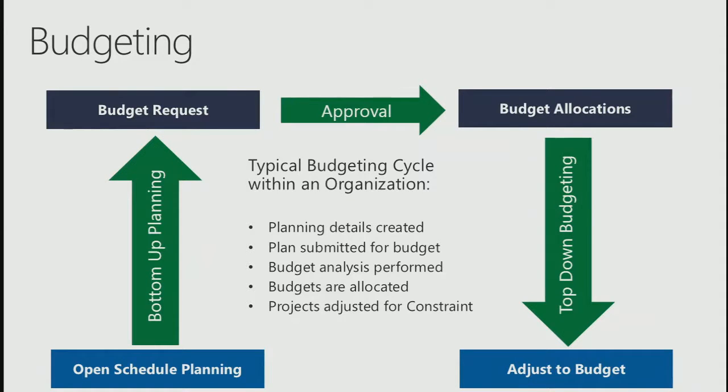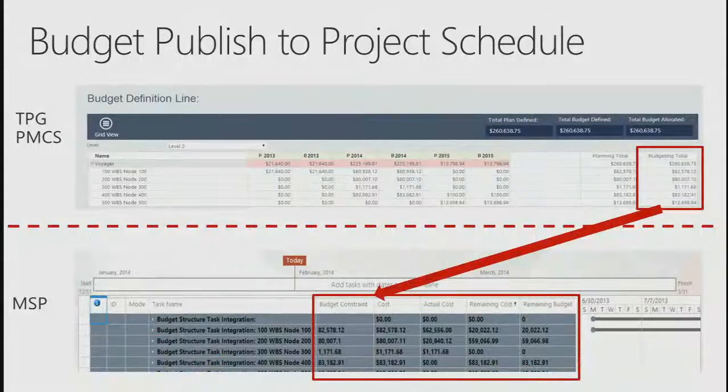And what we see here in our solutions that we have with IPMCS, for example, what we do is we can give you a top-down budget approach. We can break down budget structures, which makes sense on the top line here, and let people allocate the budget after having received the inputs from the projects, and then give this information back to the projects in order to check the budget over the next periods. And usually, again, every quarter, that's very common, can be also every month. It shouldn't be every year. You should be really more tied into this process and more frequently check and control your budget. You will be updating the forecast, and then you will see how this can be checked, and then maybe you can get a release of a new budget after that.